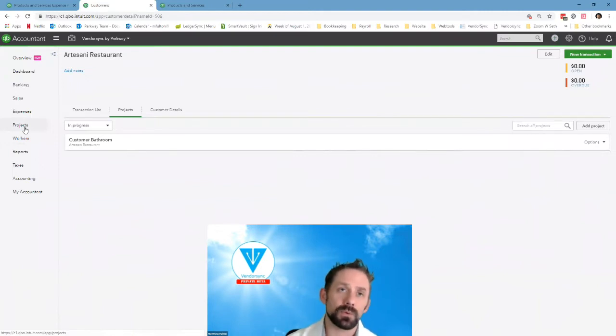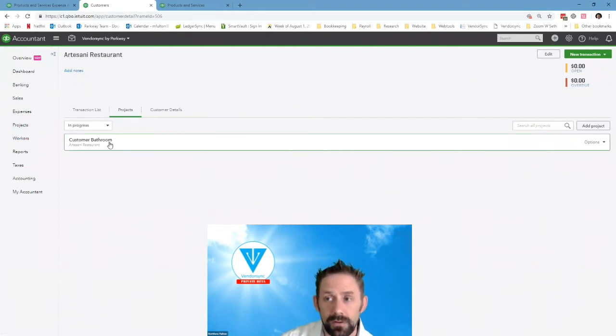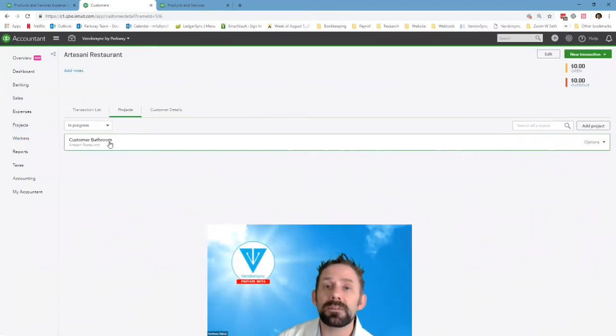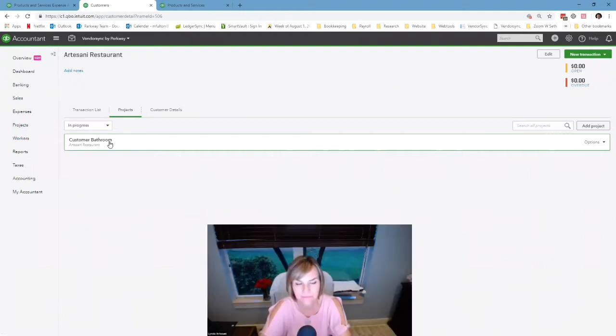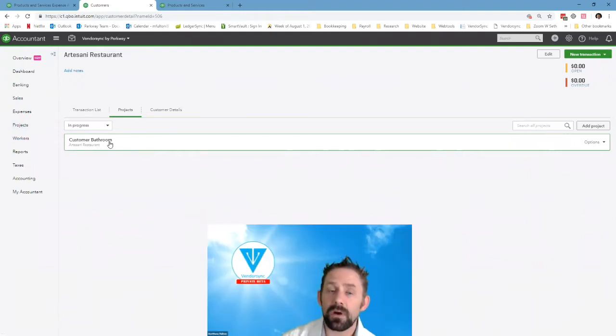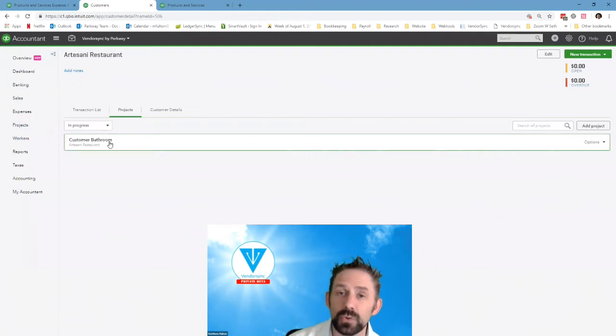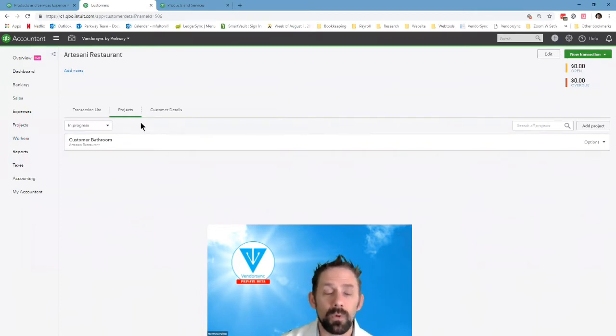Fundamentally, super, super important thing to hear me on. I can't stress it enough. When you create a customer, Artisani Restaurant, do not create the project by starting the project name as Artisani Restaurant. Do something completely different. Do an address, do whatever. And the benefit of that is because of autocomplete. Start to type it in. If you start typing in Artisani Restaurant, and that's the beginning of the customer name and the project, your employees or you are more likely to tag it to the wrong thing. Okay? So it's super, super important. Will save you a whole lot of headache.